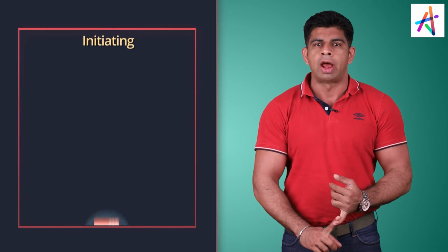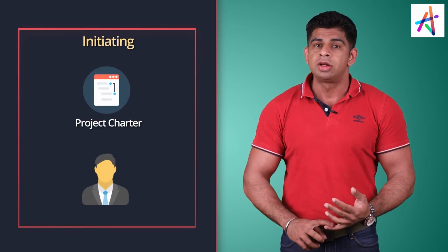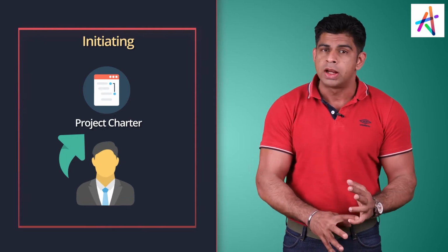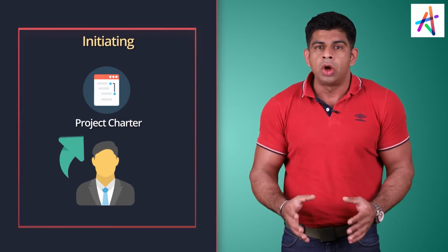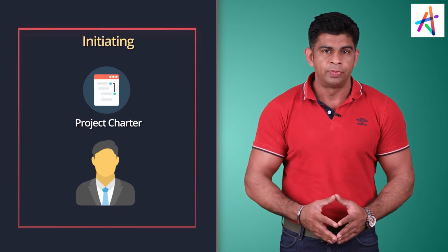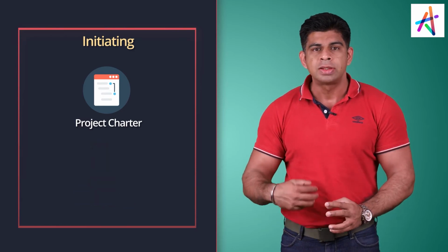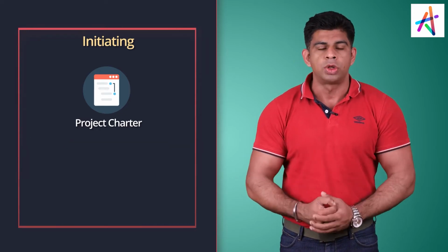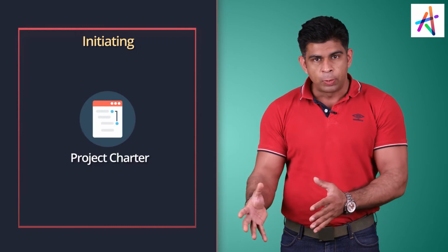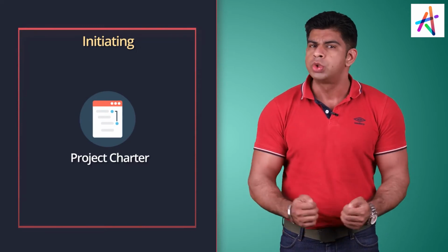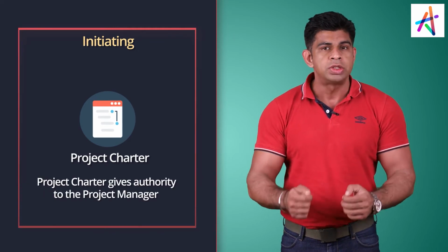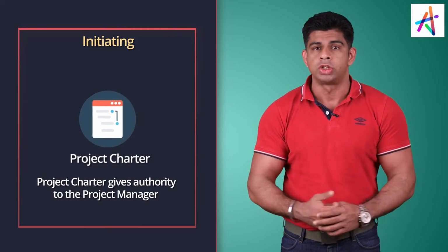Why? What do we have to do in initiating? Project charter has to be there. Project manager can participate in development of the project charter, but as a project manager, we are not accountable to get it prepared, right? This is something which is supposed to be given out to us by the sponsor. Our job starts once the project charter is given to us. You have a project charter, that's like your appointment letter. Would you ever work in a company without the appointment letter? Your authority starts once you have the appointment letter, that is your project charter.